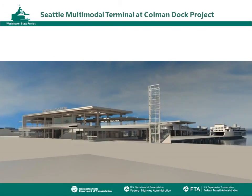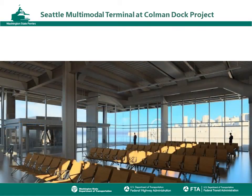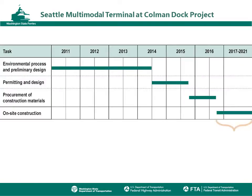Our design would integrate with the City of Seattle's waterfront plans, and the main terminal building would be designed to meet LEED Silver standards. Construction at Colman Dock is expected to begin in late 2016 and take place over 5 years in order to allow Washington State Ferries to continue providing ferry service throughout construction. At this time, we are in the period of environmental analysis and preliminary engineering.